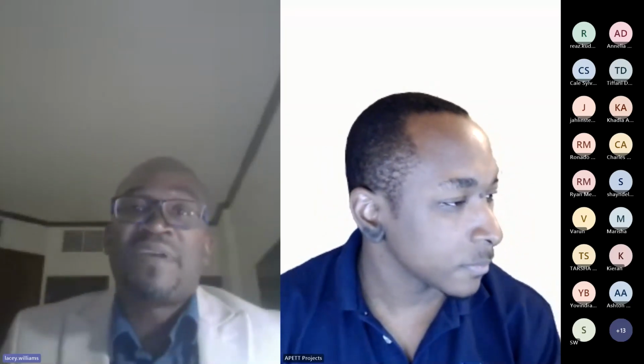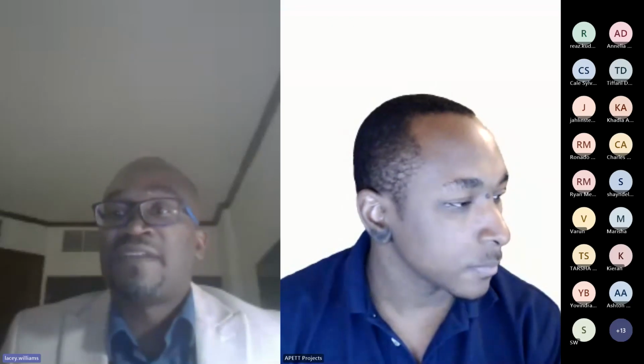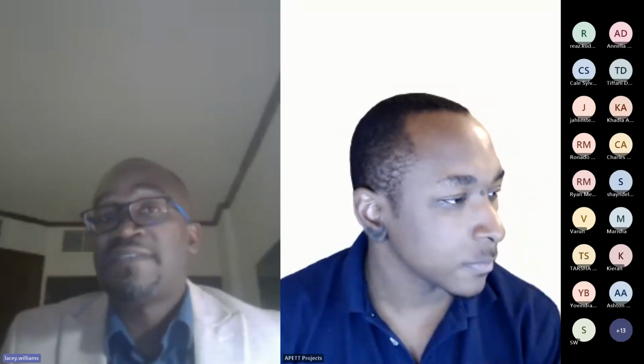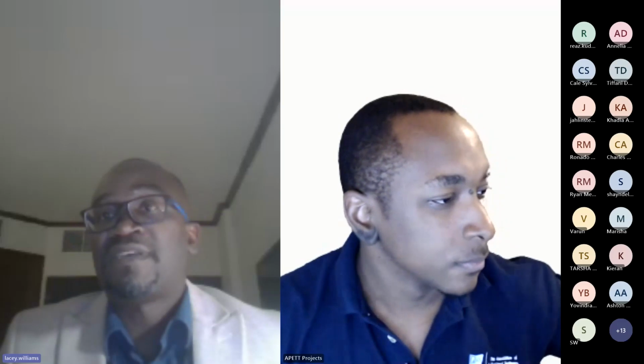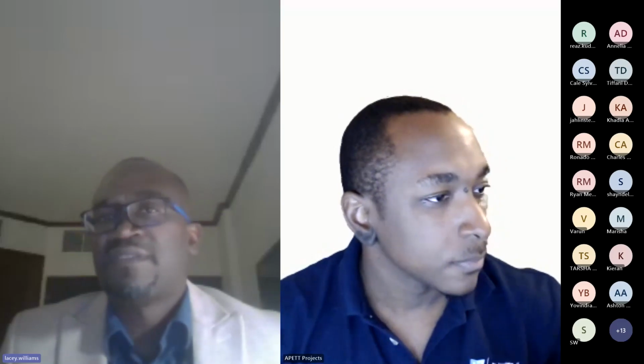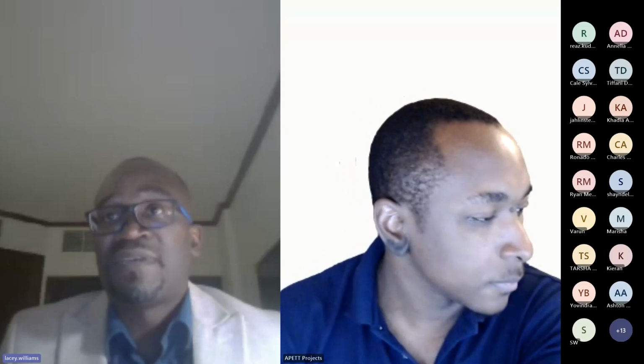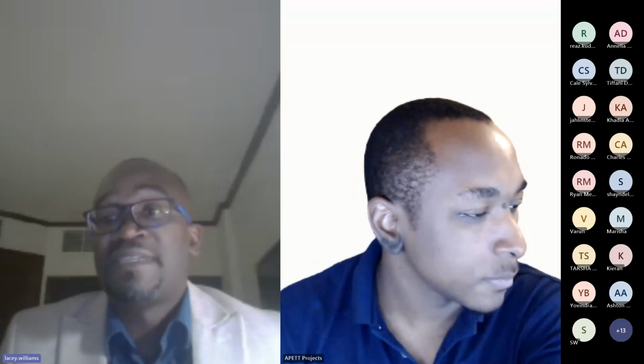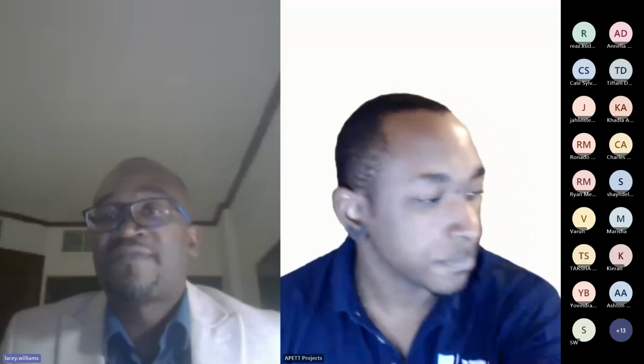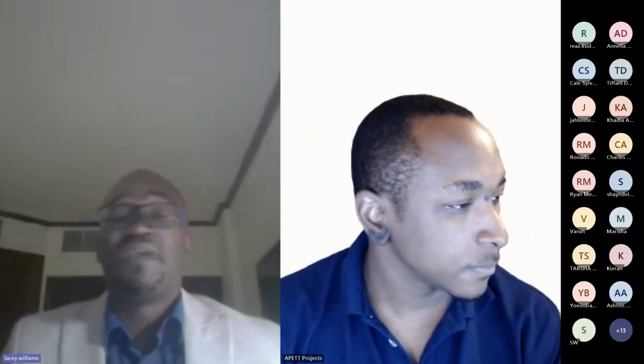In terms of staff man hours, you would probably want to have either a senior technician or an engineer on site, and the cost for that individual to and from the office, and maybe a technician or two, will probably cost you on a daily rate upwards of about 10 grand a day, right? So you just work on the math for if it's half a day, as the case may be.